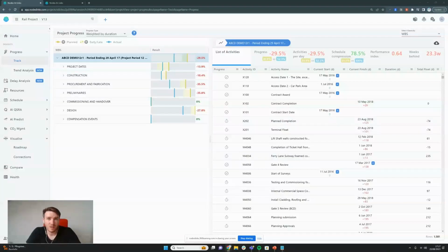One additional thing that we need to check to ensure that the schedule is of quality is how extreme the forward wave is. So we've all been there where we can put detailed planning into the most recent period of time, but things near the back end of the program are at a much higher level just because, for example, design has not been completed. We can check that in the system.